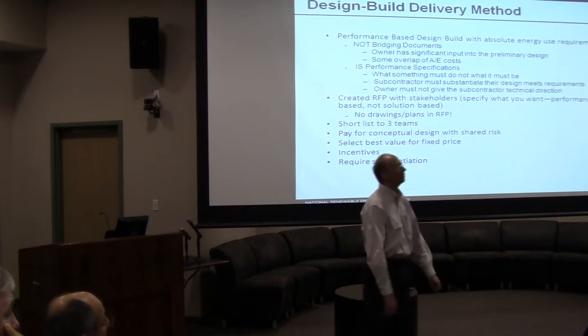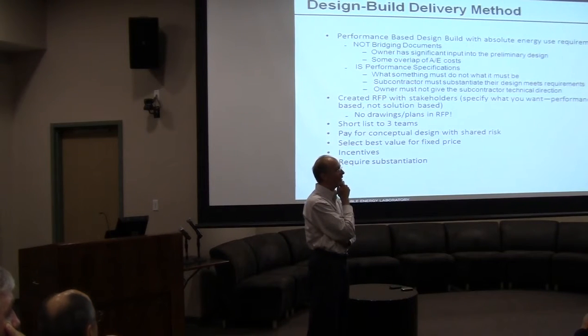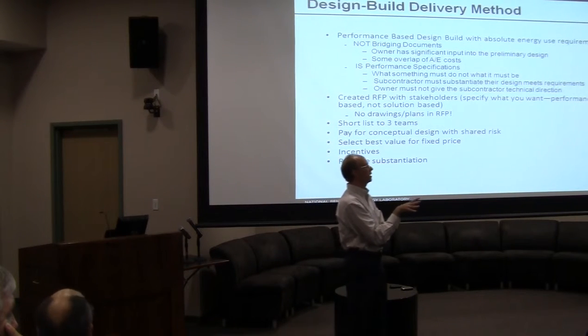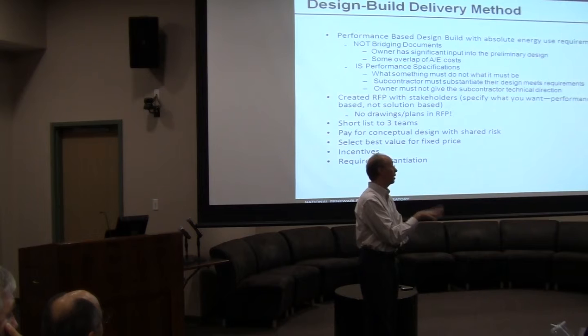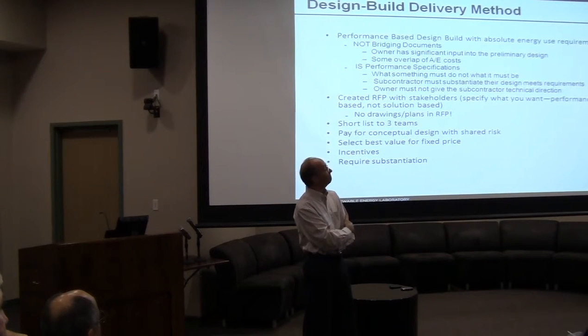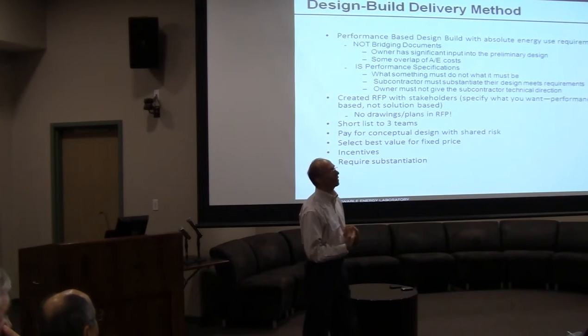Nope. And part of it is, we've heard of people trying to do performance-based contracting that way, where you hold some amount of money back and after a year you pay them if they meet the energy goal. As an owner, first of all, most of those contracts I've seen, the owner ends up paying out, whether the building performs or not. There's not enough money involved and there's too much risk of litigation. And all the design-build team has to do is say, well, you didn't operate the building right, and you're done. So we had the option of operating the building any way we wanted to.